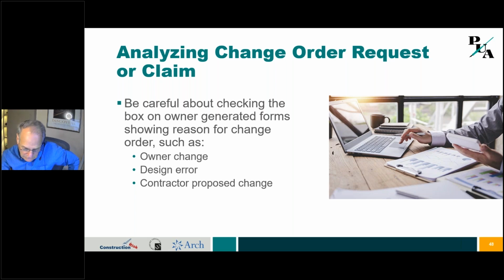The contractor put in a change order request. It was not a good change order request, and AECOM said to the owner, "Yeah, this is bogus. Don't accept this change order request. They're just simply misinterpreting my plans and specs." So the contractor denied the change order request. Then later, the contractor filed suit against the owner. Normally, you as a designer want to be working hand in glove with your owner client to defend against that. I don't mean you defend it; I mean you're providing the expert guidance to your owner to know how to defend that claim.